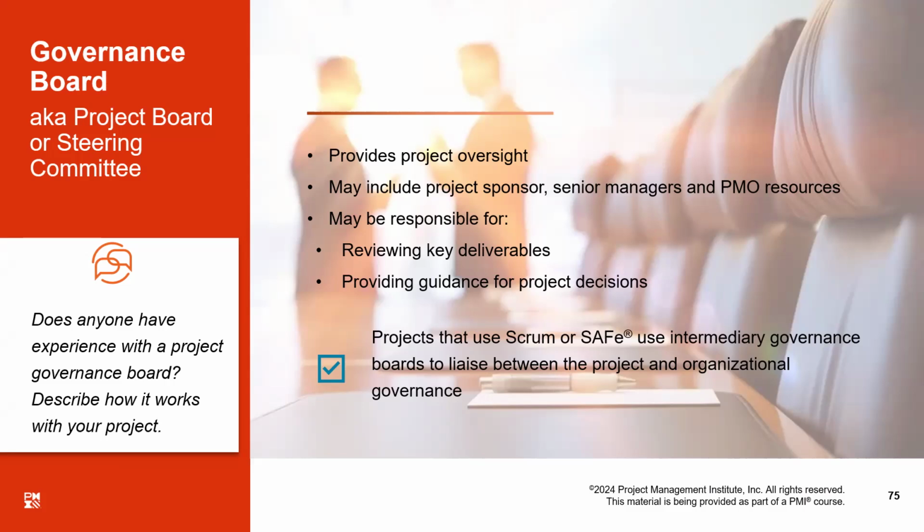Now, these three terms, governance board, project board, or steering committee, are interchangeable, but in some organizations, you may have them separately with separate roles assigned to them. But generally, for a small project or a short project, probably all of these roles are doing the same job. So you could have either a governance board or a project board or a steering committee. They are one and the same thing.